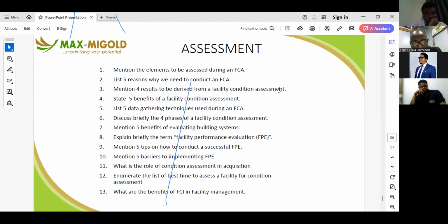Most facilities now do not have what we refer to as as-built drawings. This normally occurs because most times the contractor that commenced the project was not the one that completed it, based on maybe one or two financial issues between the contractor and the property owner. And the second thing is that majority of project managers don't know that they need to tie the cost of their as-built drawing to the financial cost of the contractor.